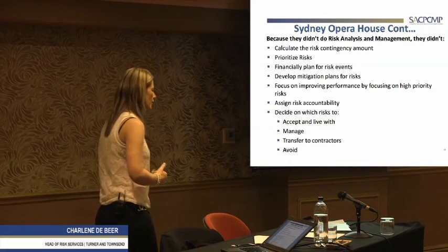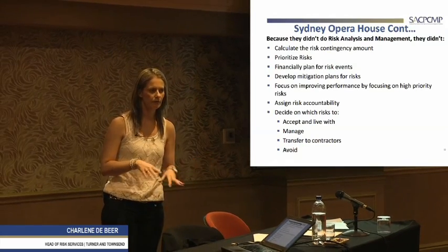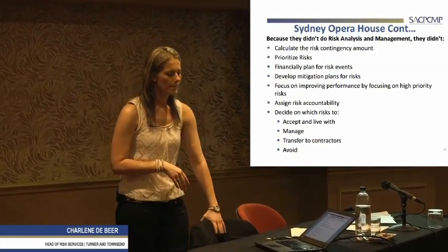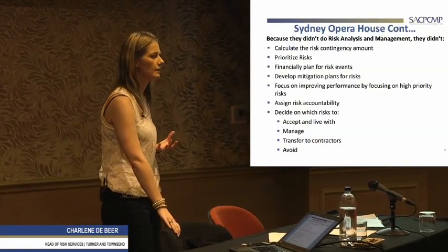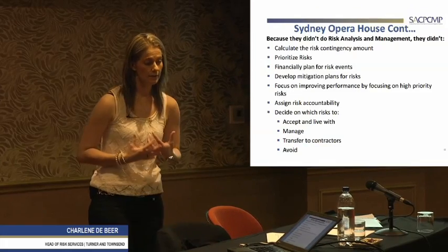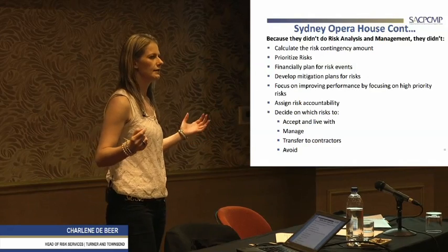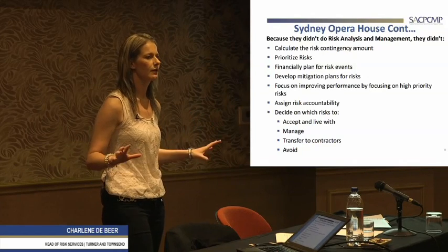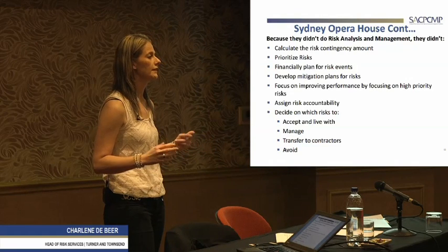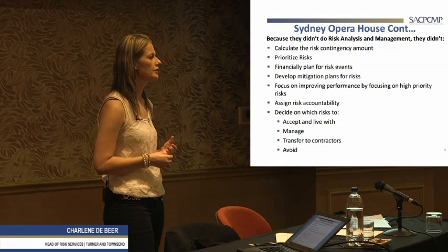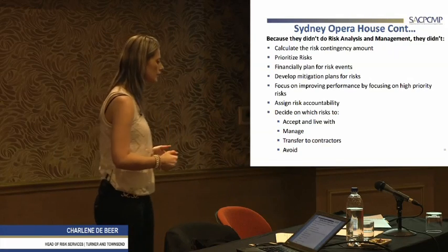So people will always say, yeah, but we've got a budget, it's got a bit of contingency, it's got a bit of growth, another scope creep or something. But the question is, it's still not a risk contingency. Which means to me, and this is the terminology I use, it's a P0 cost. It has no contingency for if anything goes wrong down the line. It also doesn't have any contingency if I need to mitigate something, if I need to pay for a mitigation. For example, how do we pay for a mitigation?